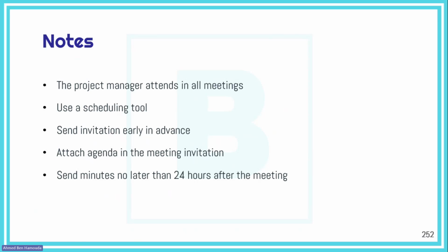The last thing in these meeting notes, before we move on to the next section to check all the templates: make sure that you always send the meeting minutes no later than 24 hours after the meeting. Usually, I tend to send the meeting minutes on the same day, clean, to all the people who were supposed to attend. But if you cannot do it the same day, or if you have a lot of meetings or your meetings end late, then make sure that you send them first thing the next day.